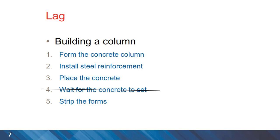Another important concept in project planning is a lag. And here is an example for concrete column, we have setting the form work as the first activity, then the steel reinforcement cage is placed in the form work and then we can pour the concrete. There is a period of wait for the concrete to set and reach the required strength and after that we can strip the form work.